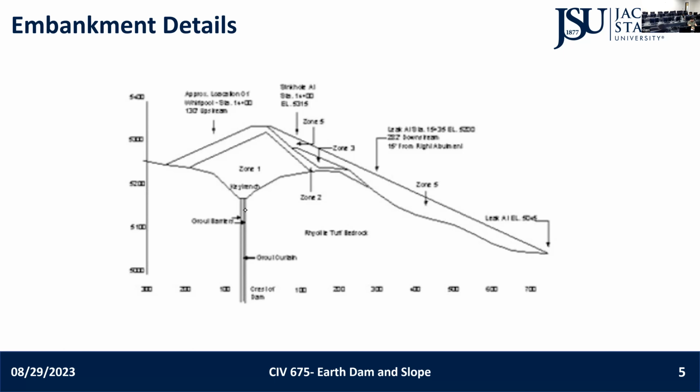Okay, so in this case, basically for the design-build type of system, the first thing needed is a preliminary design. So the client is supposed to have a consultant who should listen to the client and do the preliminary design. The preliminary design is the recommended method given by the agency and given to the contractor. And then the contractor is supposed to come up with a design-build team who will follow that, but they can make changes. But they cannot turn it upside down. And this is how it's being done here, in most of the cases. So they just give the design recommendation, not the actual design. So the basic money the contractor is going to make is through value engineering.